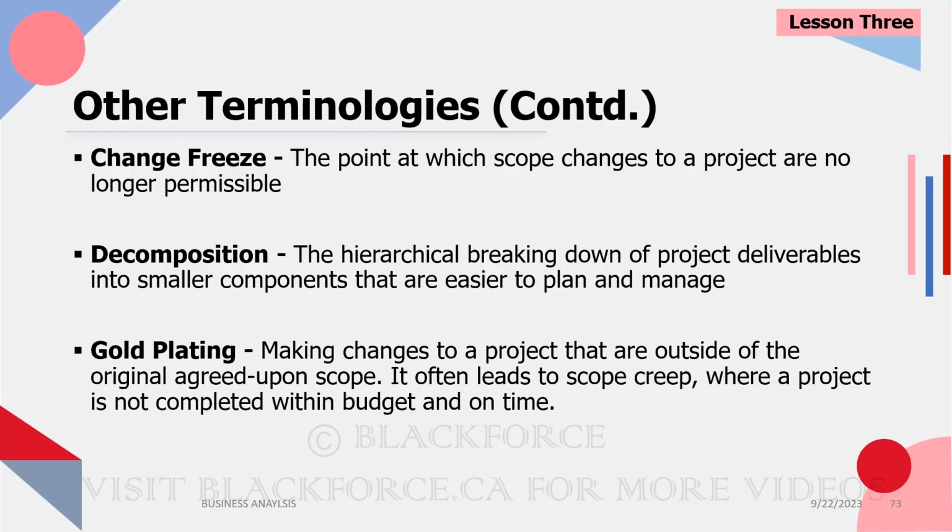I use the word may because they may be removing 10 from the original 100. These 10 are no longer relevant, and these are the 10 that are relevant. So it's a timing thing too, right? But just know that scope creep is when it is the business asking for more than was agreed on. Gold plating is when it is the team, the project team, that is doing more than what they've been asked.